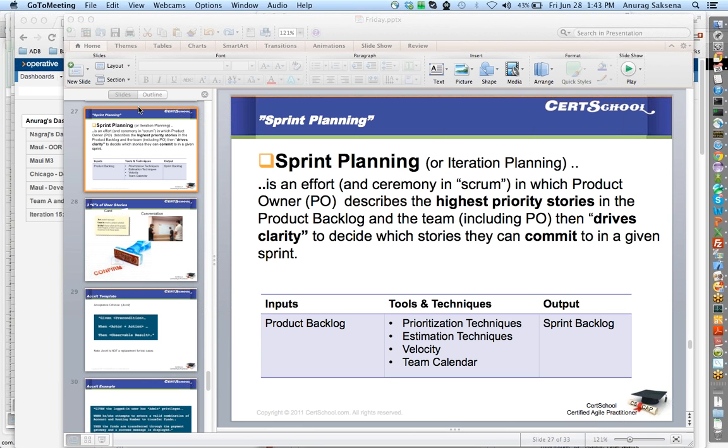as they go sprint after sprint, so they know when to start the sprint planning for the upcoming sprint. Usually I start doing sprint planning for the next sprint 4 or 5 days in advance. My sprints are 2 weeks long, so when I'm halfway through my sprint, I initiate the sprint planning for the next one. It doesn't mean that I'm doing sprint planning every day for all those 3 or 4 days, but it is going on as a parallel effort, consuming some of the time of the team members. So you want to factor in that time when you're doing sprint planning.